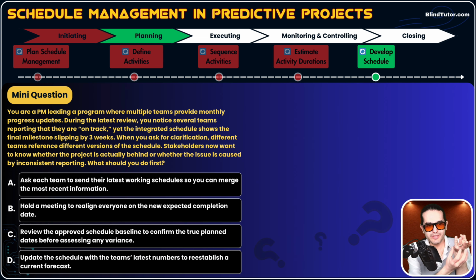You compare it with something, and that is the baseline. When we're talking about a schedule, that baseline is called the schedule baseline, the promised dates, okay? Not the project schedule. The current schedule data is recorded in the project schedule, but the promised list is in the schedule baseline, okay? You notice the question states that there are multiple versions of this.